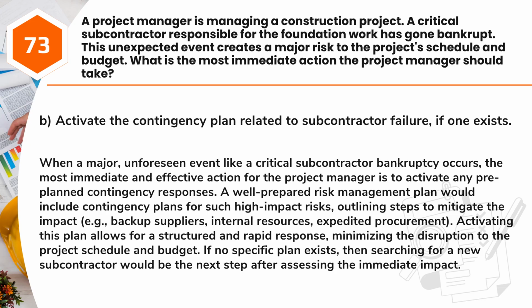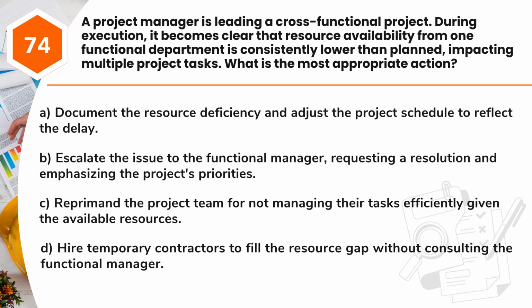Activating this plan allows for a structured and rapid response, minimizing the disruption to the project schedule and budget. If no specific plan exists, then searching for a new subcontractor would be the next step after assessing the immediate impact. Question 74. A project manager is leading a cross-functional project.